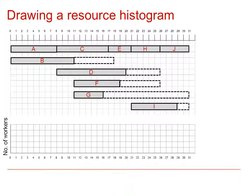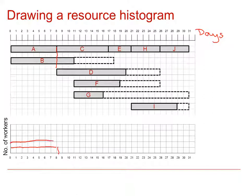This is the same Gantt diagram we had earlier, also known as a cascade chart, and we're going to use this cascade chart to draw our resource histogram. Looking along the axes — we're going to call this the number of days — we can see that from 0 to 8, so for the first 8 days, we only require 2 workers. So on our diagram we can draw in both A and B up to 8, and it's really useful to label your blocks or bars as you go along.